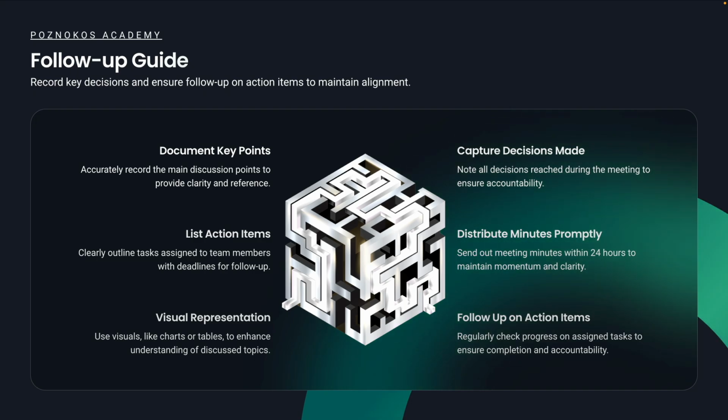So next one, it's distribute minutes promptly, send out this follow-up within 24 hours to maintain momentum and clarity. Yeah, don't make your team wait for this. And visual representation, for sure, if you can provide some tables, charts, you can attach them.